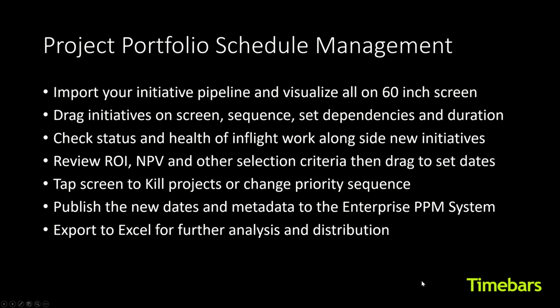Project portfolio schedule management. Well, we looked at that in the demo. We want to check the status and health of in-flight work, review the ROI, net present value, and other selection criteria, then drag them and sequence them. Tap the screen to kill projects or change priority. Publish new dates and metadata to the enterprise system, or export to Excel for further analysis.